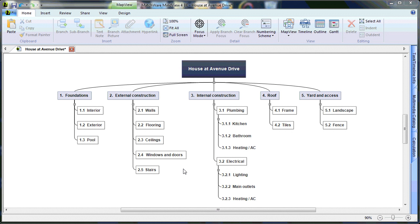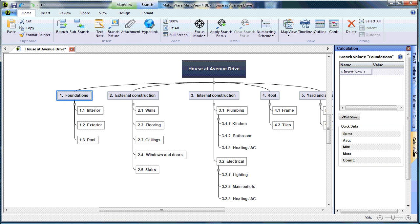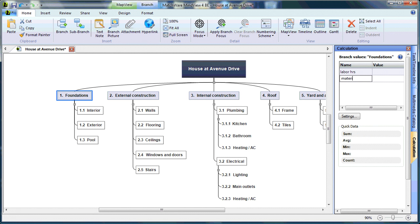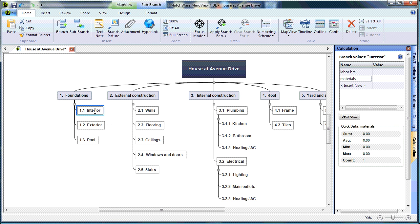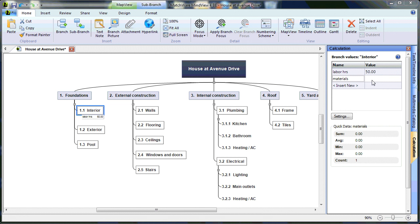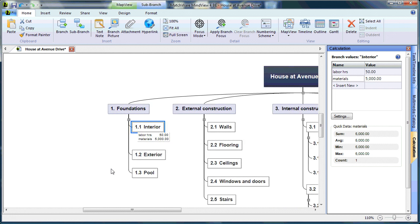If you'd like to add costs to your WBS, simply select a desired stage, open the Calculation tab, and create your first variable. For Foundation, we will create Labor Hours and Materials. Once I've created these variables, I can access them from any point in the Work Breakdown Structure. For Interior, we will say it will be 50 Labor Hours and $5,000 in Materials. As you can see, the costs have been included on the desired branch.